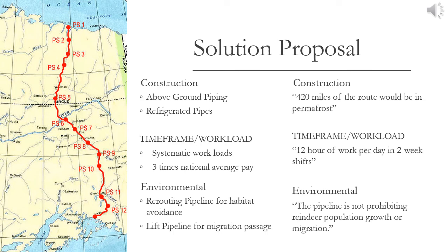The embargo of the Arab Petroleum caused the project to prioritize its completion as soon as possible. Putting an emphasis on time, the project needed to be completed in 3 years and 2 months so the oil from Alaska could be traded nationally. The Alaskan climate made for extremely hard work conditions with OH&S concerns. With these harsh conditions, the need for the project to be completed fast and an organized system for workers was issued to follow for the project to fit the time frame.